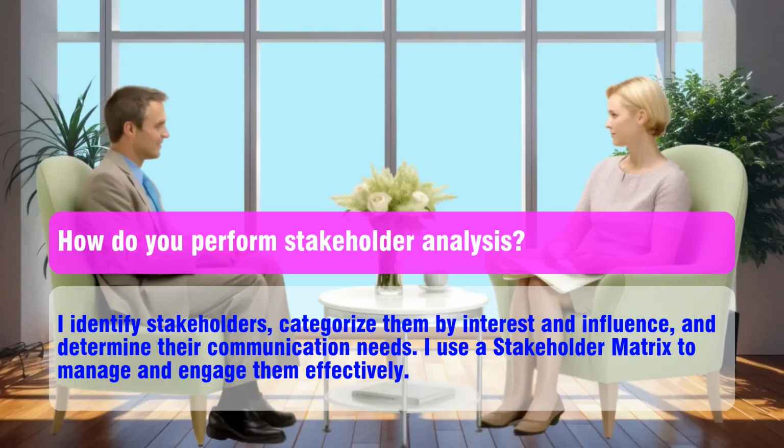How do you perform stakeholder analysis? I identify stakeholders, categorize them by interest and influence, and determine their communication needs. I use a stakeholder matrix to manage and engage them effectively.